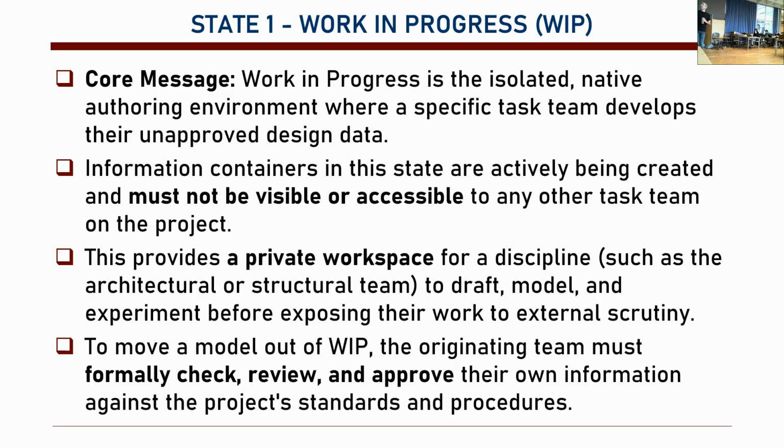So this provides a private workspace for the discipline. Okay, so that we can draft, we can model, we can experiment, we can make any kind of changes we want, because no one will bother us. It's our own place. It's a playground. If you want to move your model out of work in progress, okay, you have to formally check, review, and approve, so that your model is working with the project standards and procedures.